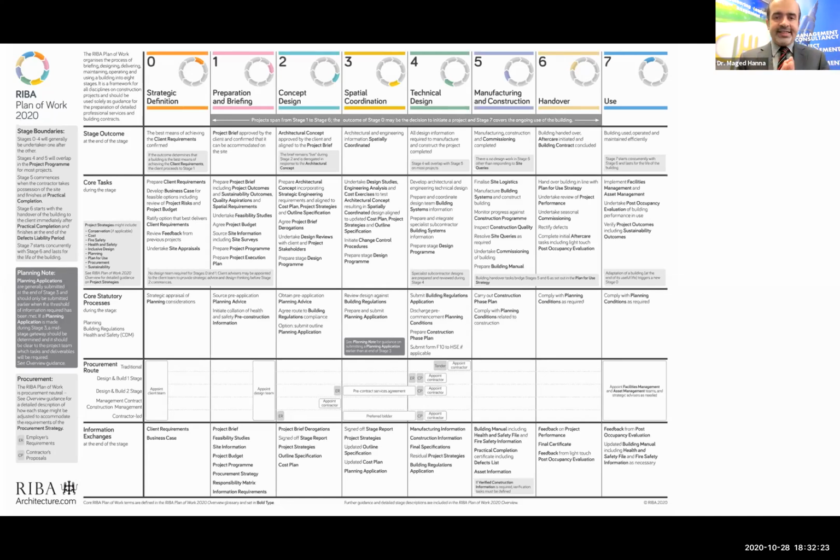If we finish all these stages, we are moving to stage 5, which is manufacturing and construction. When we talk about manufacturing and construction, the design has been done for the tender. We have a detailed design, everything is very clear, we have submitted tenders, we receive the tenders, we evaluate them, and we award the contractor. So here, it's the stage of execution of the earlier approved design.